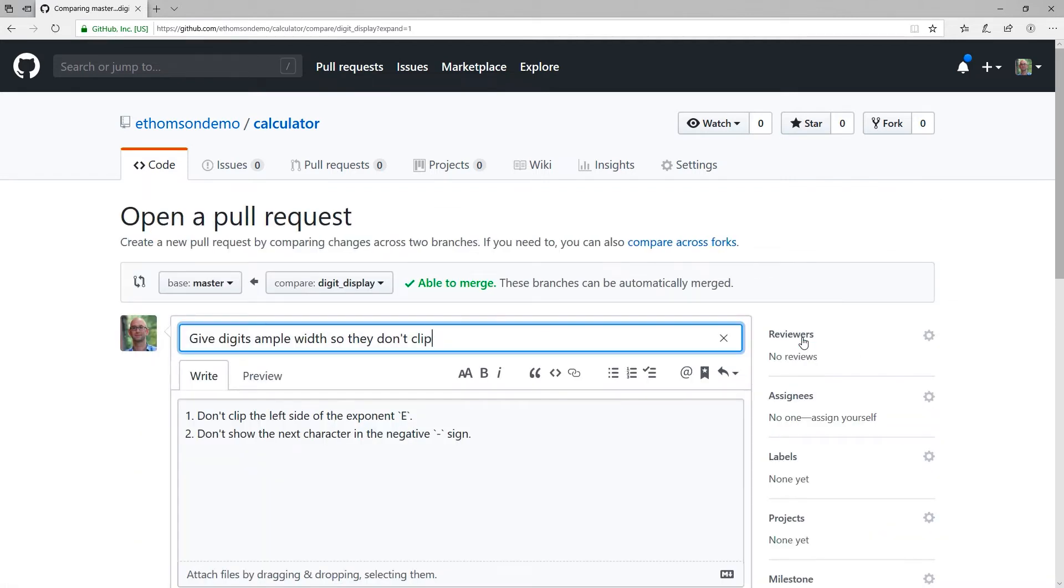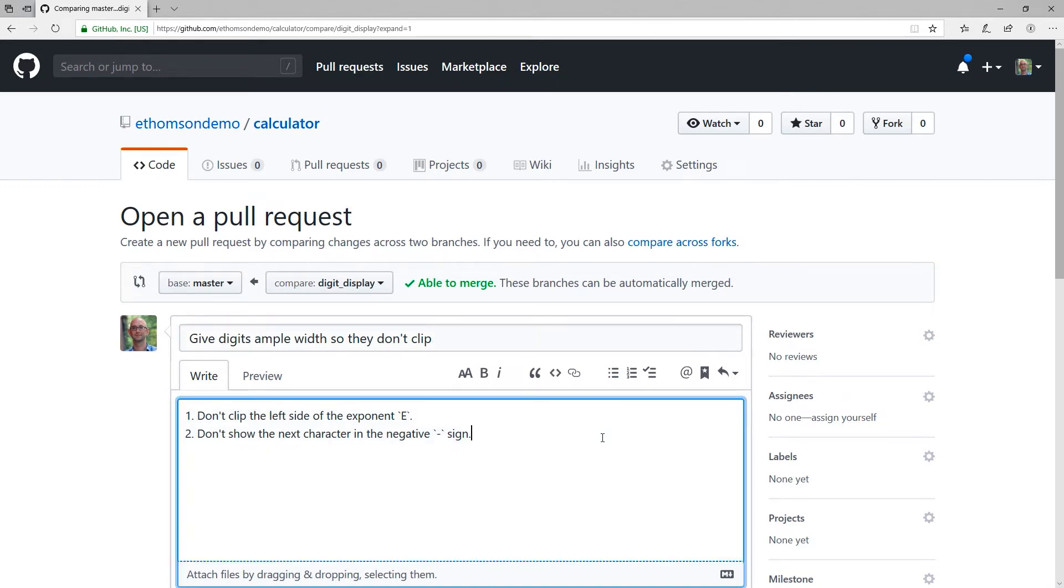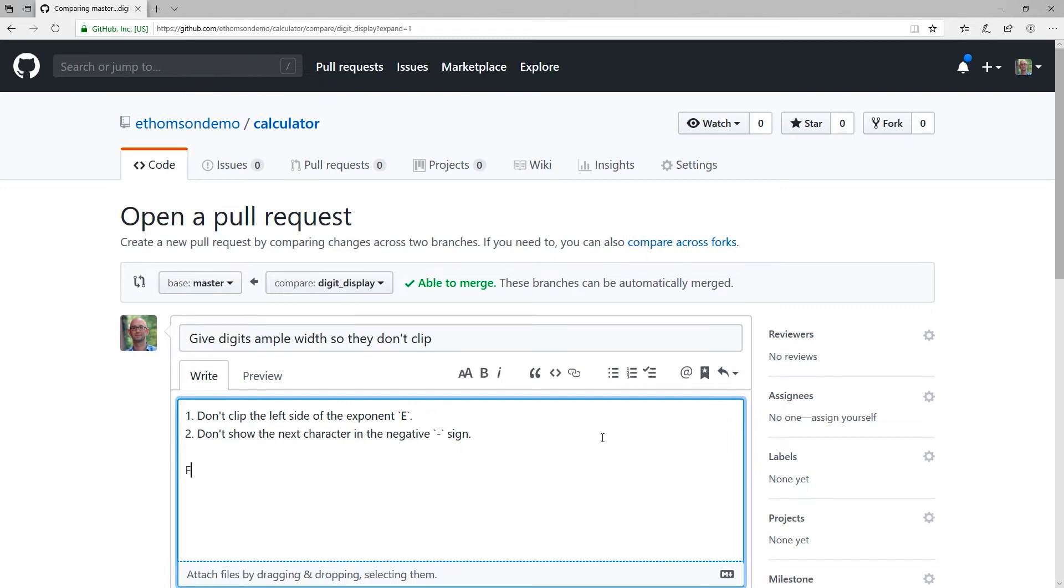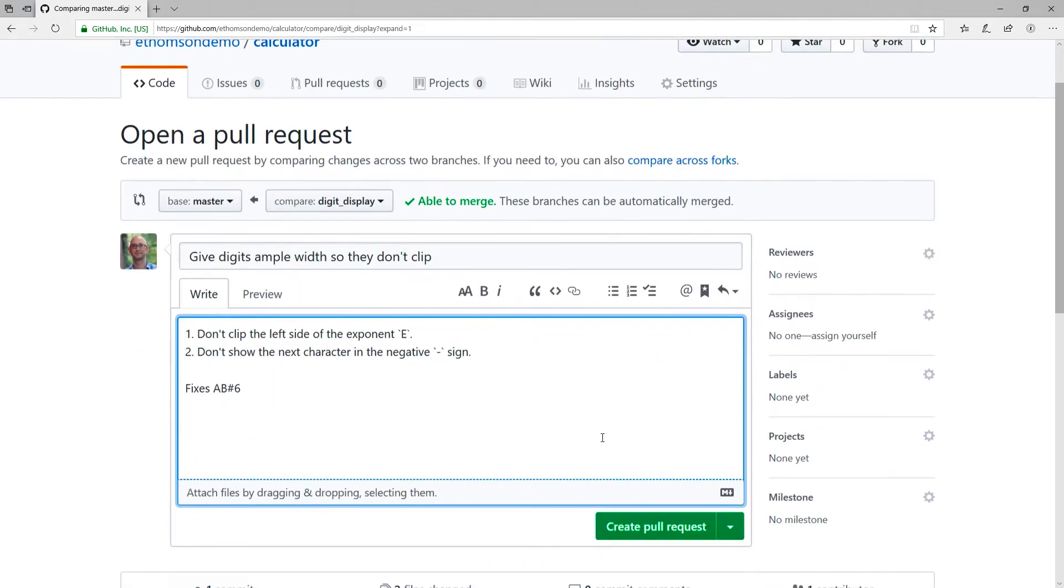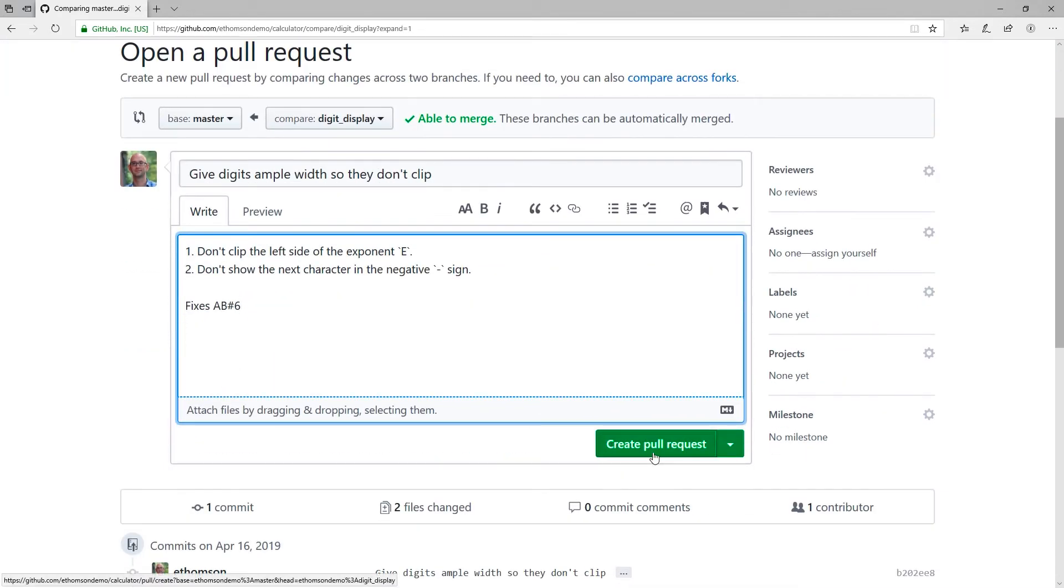And now the new pull request screen is where I'm given the opportunity to link this pull request to Azure Boards. What I want to do is go into the comments area, and I want to use what's called a smart mention. And that is what Azure Boards actually looks for to understand how to link a pull request to a work item. So what I want to do is type fixes AB number six. AB number six, of course, means Azure Boards work item number six. That was the one that I moved from the to-do column into the doing column. Okay, now I want to scroll down and click create pull request.